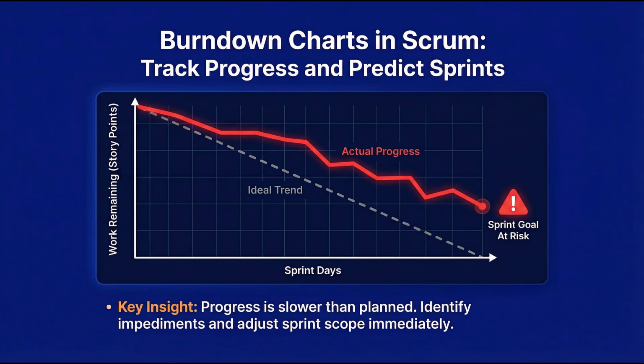Retrospective. Review velocity over the last 3 to 5 sprints. Commit to only 80% of calculated capacity to account for unknowns. Address systemic impediments with leadership. I worked with a tax audit reporting team that had this pattern for 6 sprints straight. Root cause? They didn't account for mandatory weekly management meetings that consumed 6 hours per person.